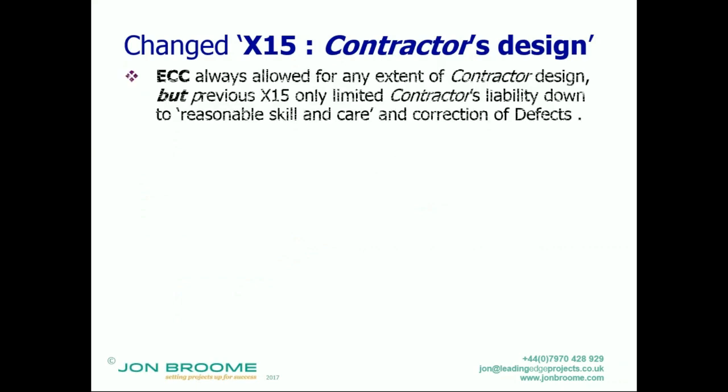There's a change to the X15 contractor's design. Previously, the engineering construction always allowed for any extent of contractor design, but the previous X15 only limited the contractor's liability down to reasonable skill and care, because contractors in construction, civil engineering, or consultants, I should say, can't get fit-for-purpose insurance cover.